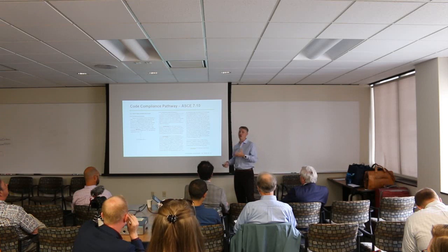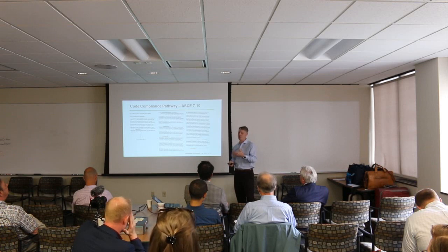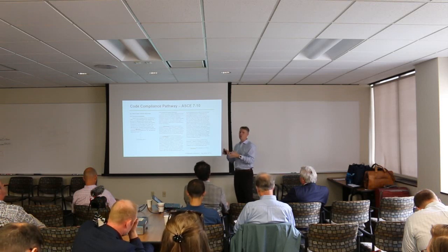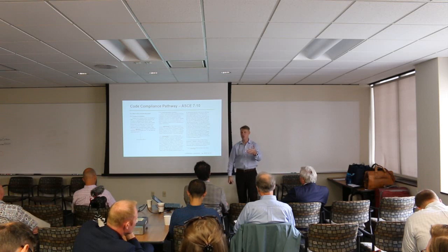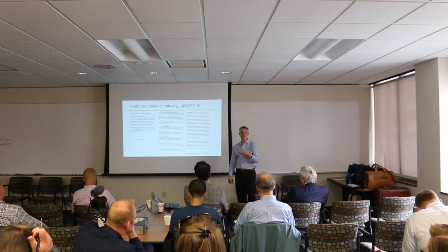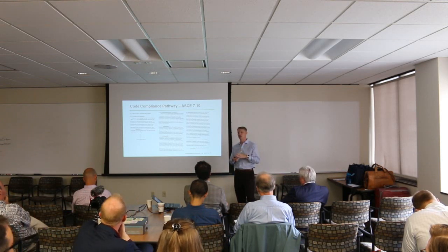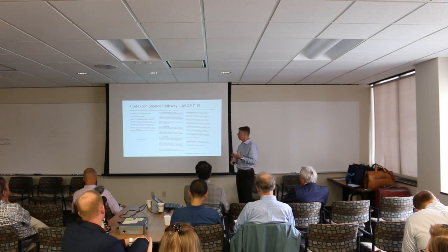If GLR brought in Joe Blow out of his garage, it'd be really quick and easy to realize that person doesn't have the qualifications to peer review a 20-story building. So that's what we did with the state of Oregon: each person brought in their own peer reviewer and their qualifications, and just sat down with the building official and said, here are their qualifications, here's what they can do. And it was pretty easy. It's not hard to see if they can meet that level of expertise to peer review it. And so that's what we did for the Oregon project.